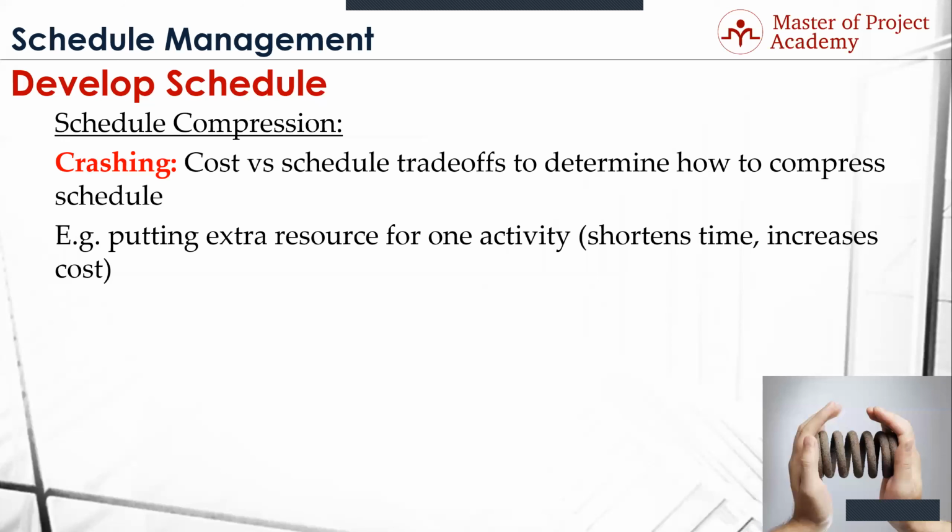Typically, crashing is, well, I've got 4 resources, let me add 2 more. And typically, this is the response for most bosses. Oh, you're having problems on your project. Let me give you some more people. They're never the right people. They're just people. And if they're not trained, you could run into that law of diminishing returns, where it's a worst case scenario rather than helping you.